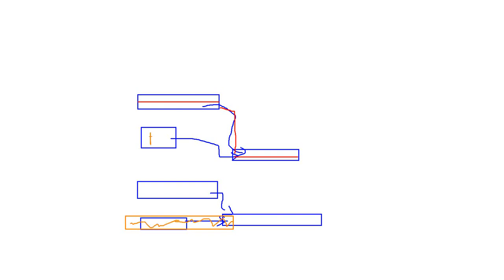So tasks, let's call this A and B. Task B can be so variable that perhaps it's going to last longer than A. So that is going to push C, right? This is going to be C. It's going to push C. So the critical path now is going to be this, and then it's going to be this, right? Instead of going this and that.